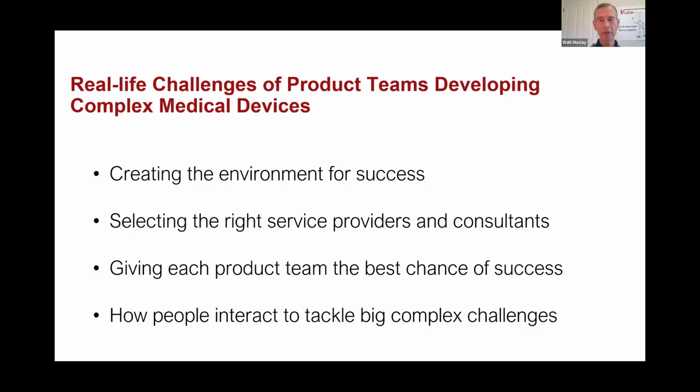You want to identify the risks early. There may be technical, marketing, schedule, or budget risks. Identify those early and mitigate them as much as possible, as Aaron pointed out, to the point where you can proceed predictably. If you can get everybody to communicate well and do these things, that gives you successful projects.